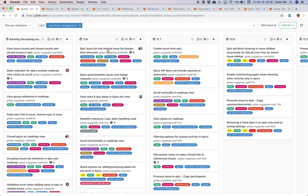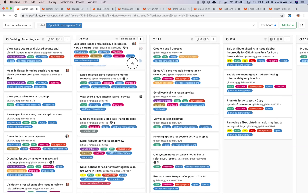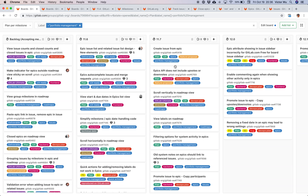These are issues I care about that I've already slotted to be worked on in specific milestones — I've done some filtering to show only issues relevant to my team. In the 11.6 milestone I've already scheduled 10 issues worth a total of 11 points of weight. At GitLab we have story points, which we call 'weights' — this issue has five story points, this one has three. In this board you can drag an issue from one milestone column to another.